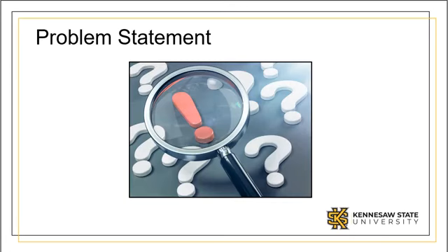The problem statement should include a reference to a baseline measure for guidance. A baseline measure is the level of performance of the particular metric at the initial start of the project. The baseline measure helps to identify the areas in the company that are in the greatest need of improvement. Sometimes baseline measures will not agree with our assumptions. Be prepared to investigate and recalibrate if needed.